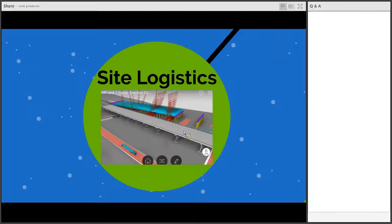Because in general, where BIM really helps you is it solves problems digitally before it becomes a real problem in the field. The analogy I like to use is it's hard to appreciate the bus you never got hit by. Meaning, let's say, for example, site logistically, we didn't think the plan all the way through. We stored a bunch of materials, and then when it came in one location, and when it came to set pre-stressed beams or steel beams, our crane was out of radius. So then we're scrambling to move a bunch of things, or potentially we'd even put an excavation where we shouldn't have, so that it becomes a huge problem. So by building the project digitally, you're solving problems.